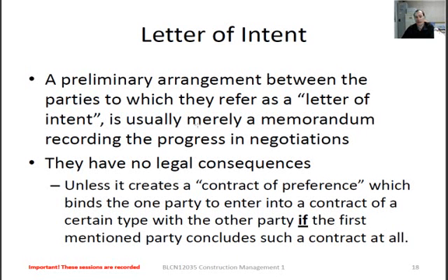All right, so really interesting stuff here. Yeah, Josh, just with the contracts that we let, for the other guys that don't know, I work in commercial construction, and we let a lot of letters of intent, and a lot of the guys have started work already without us actually issuing a contract. But in the letter of intent, we specify, as per negotiations, the scope of works that was agreed to and signed on, and the contract sum, and payment terms, and liquidated damages, and retentions. So we do list quite a lot of it in the letter of intent.